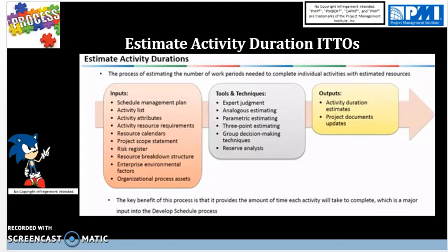These are enterprise environmental factors that are not in the control of the project team and influence or constrain or direct a project. The examples of EEFs include resource location, availability, and skills. Another input is OPAs. It is formal, informal, internal policies and procedures specific to scheduling and also historical information on activity duration for comparison purposes during the planning phase of schedule management.